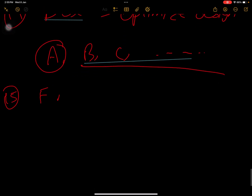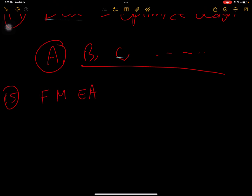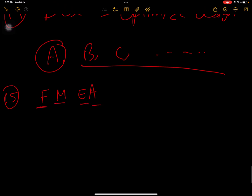Another tool is Failure Mode Effect Analysis (FMEA), used heavily in aeronautics. It examines how things will fail — which things can lead to failure and how they can fail. It is like a post-mortem, looking at what caused failures. You can also do a pre-mortem, looking at how things could fail before they happen. Both post-mortem and pre-mortem can use failure mode effect analysis.